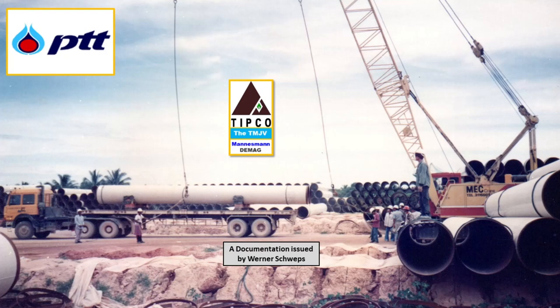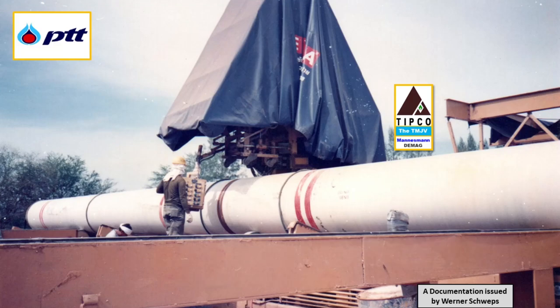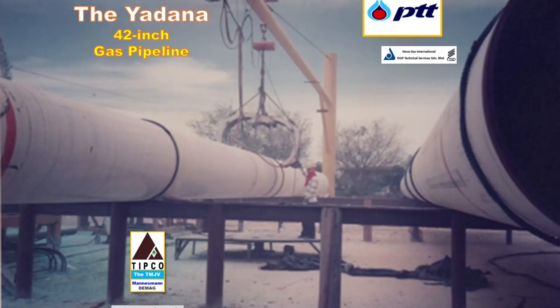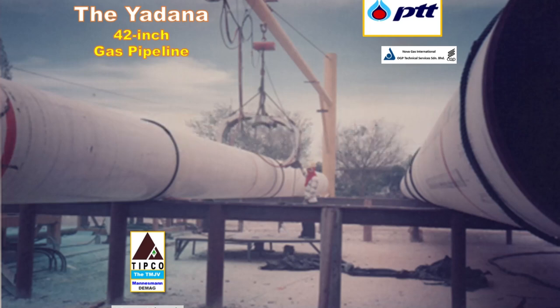In the middle of April 1997, we received the Japanese-manufactured 42-inch pipes in Ratchaburi from PTT and we double-jointed most of those pipes, meaning that two single pipes were welded together in our so-called double-joint fabrication yard in Ratchaburi. Non-destructive tested by X-ray and after passing test results, the weld joint was then fusion-bonded epoxy-coated.